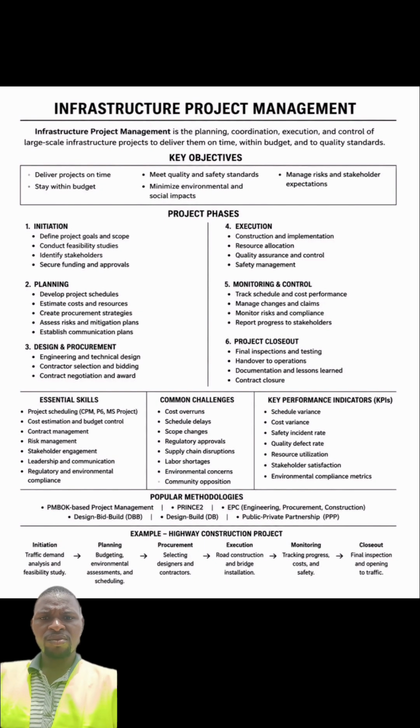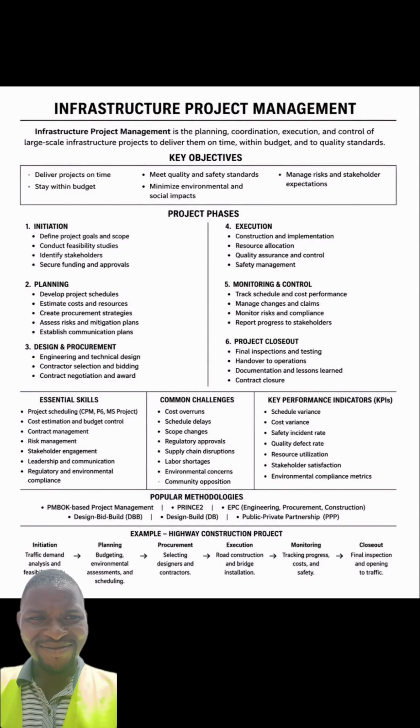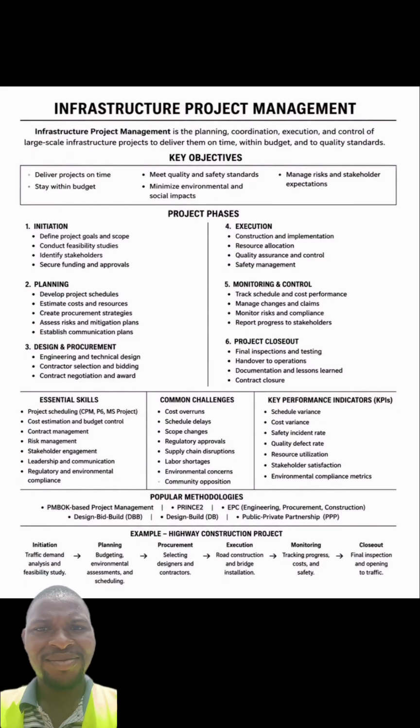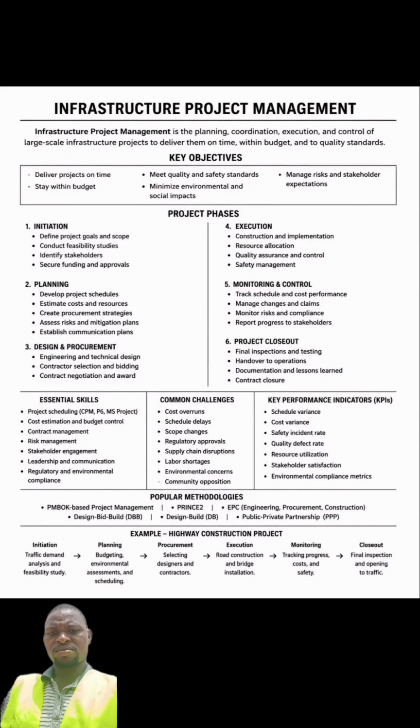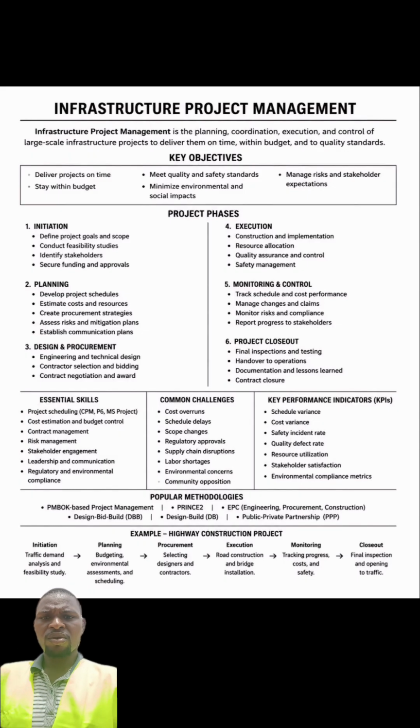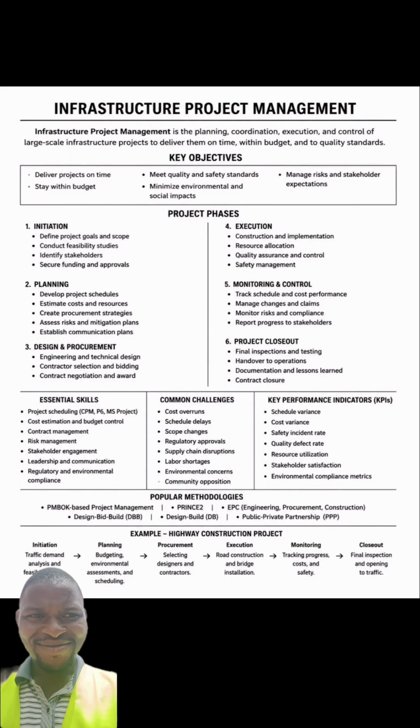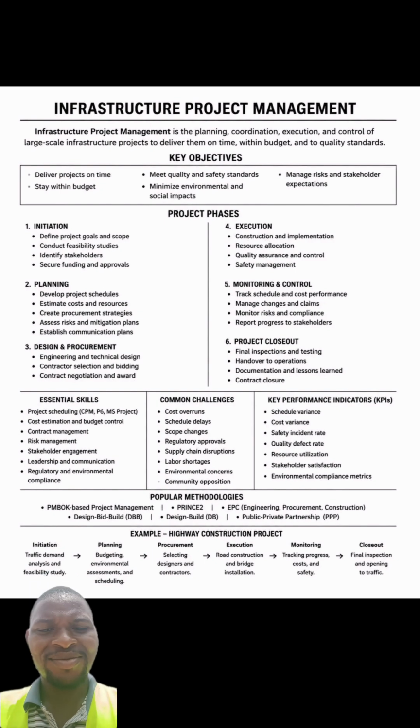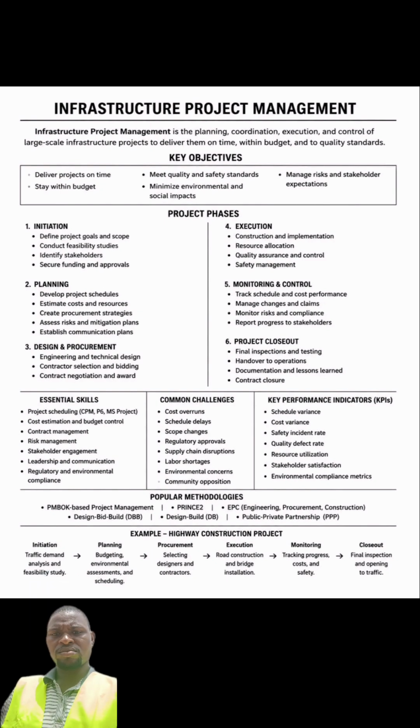So progress report is very, very essential, because at every level, sometimes in the ministry, you tend to make your claims with percentages. So at every level, you need to give your progress report. Maybe at stage A, you have to write your progress report with photographs and maybe your soil test reports, and all those things.